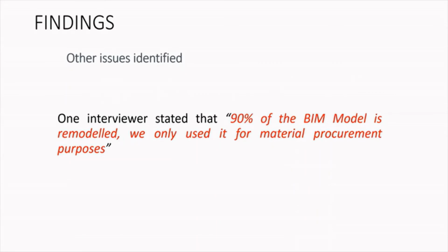Another issue, which I wanted to summarize everything. One of the interviewers stated that as far as they're concerned, 90% of the design model would have to be remodeled during construction. They mentioned that they only use the design model for material procurement purposes. This is quite amazing. If you look at the amount of work that needs to be done, 90%, there's a high chance that you would lose data.